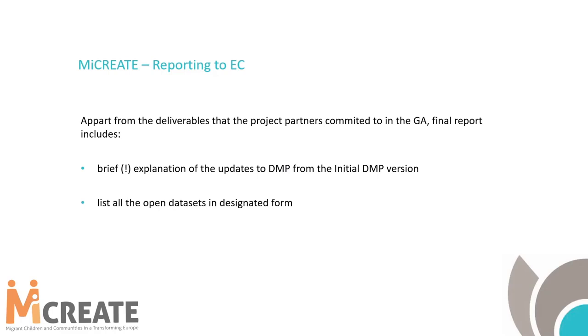There is a lot of reporting even during the project life cycle. As I said before, apart from the deliverables that we were committed to deliver at the end of the project, regarding the DMP, there is just a short section, and it's emphasized by the European Commission, where you have to briefly describe what changes you made to your initial data management plan until your final version of the data management plan. So these were practically three chapters that I had to write down to describe what the changes were.